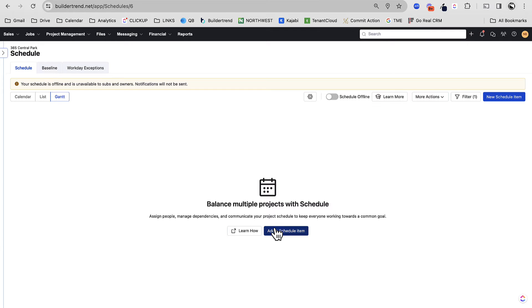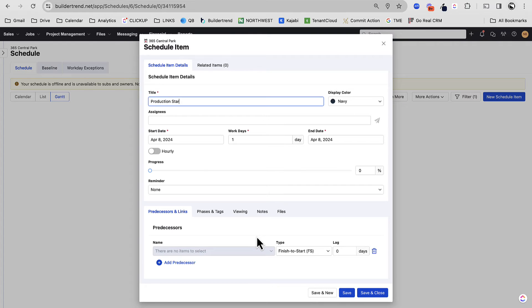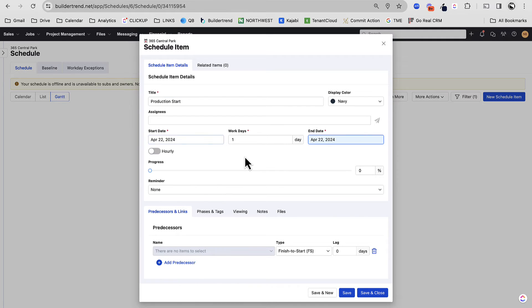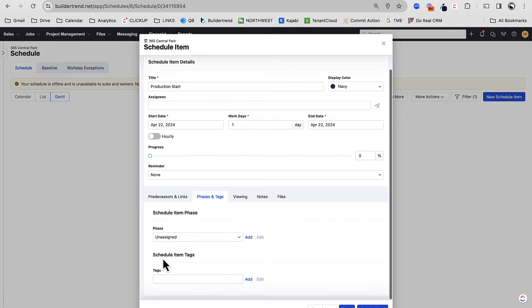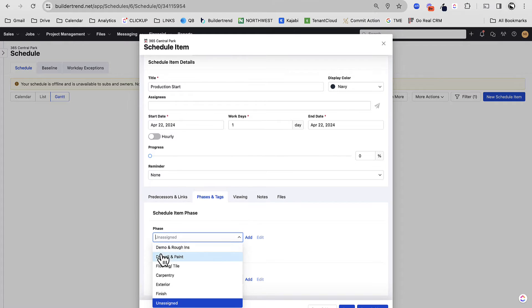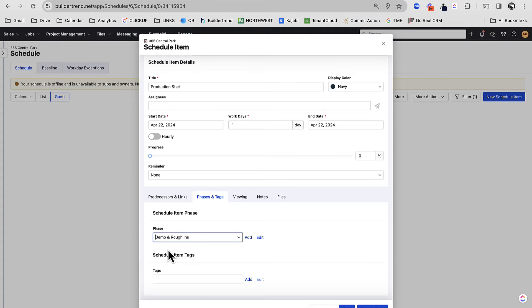So let's build our first schedule item. What I encourage you to do is to create your first schedule item as production start. Really simple. Production start is my first schedule item. Leave assignee blank for now. Let's just set some date. This is going to be a one workday thing. No reminders, no predecessors yet. I'm going to put this as demo and rough ins. Let's save and close. Let's just start to populate my schedule here.